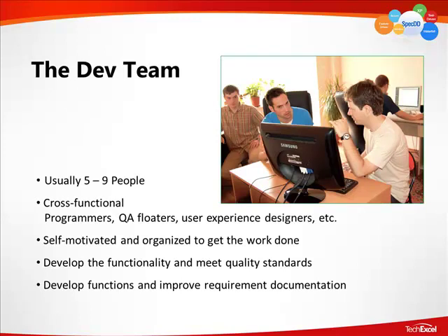The development team, obviously essential to any development methodology. SpecDD recommends typically 5 to 9 people per team. Nothing too low, nothing too high. If the company is a little bit smaller, then of course 3 or 4 is acceptable as well.